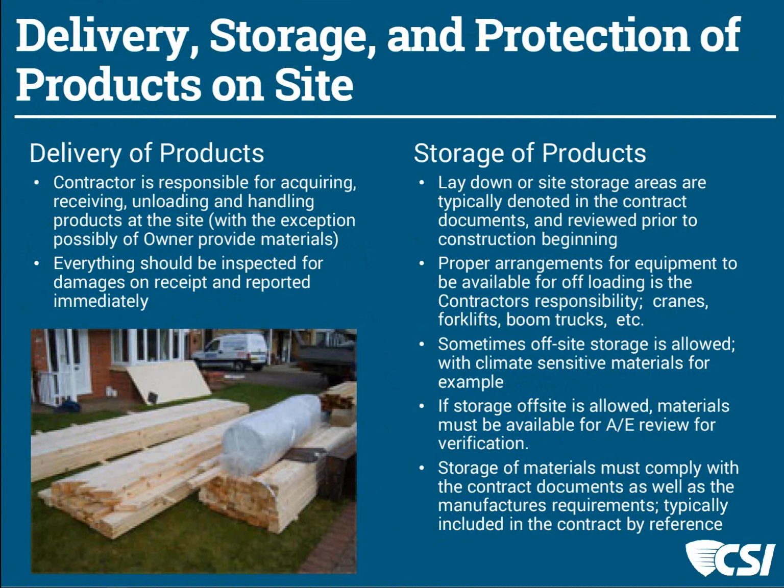And then we need to be involved in seeing those stored materials to be sure that they are properly stored before they're paid for. And all of that storage must be in compliance with the manufacturer's requirements or in our contract documents as we reference how they must be paid and how they must be stored.